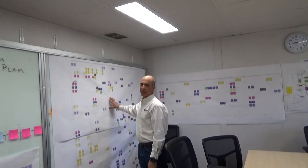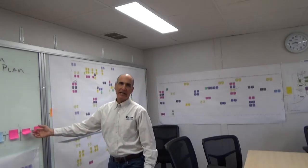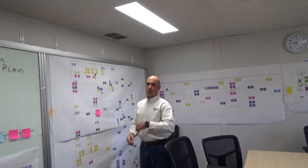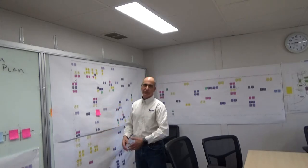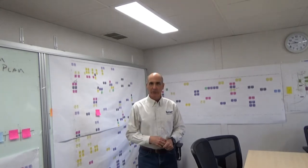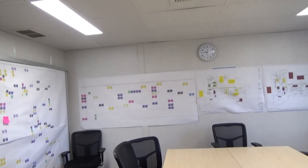So again, more V planner, more make ready. The last thing I'll leave you with is the V planner is an excellent tool. We have found from improving the process that in the foreman's meeting, we plot out the V planner in the post-it visual, very easy, and they can add tags. When we distribute the weekly work plan, we spit out the Gantt view. So the foreman in the daily huddles in the field are using the Gantt view of the same thing the foreman are committing to, posted in the room. So there goes our simple display and illustration of what we do at Illumina, implementation of the last planner system.